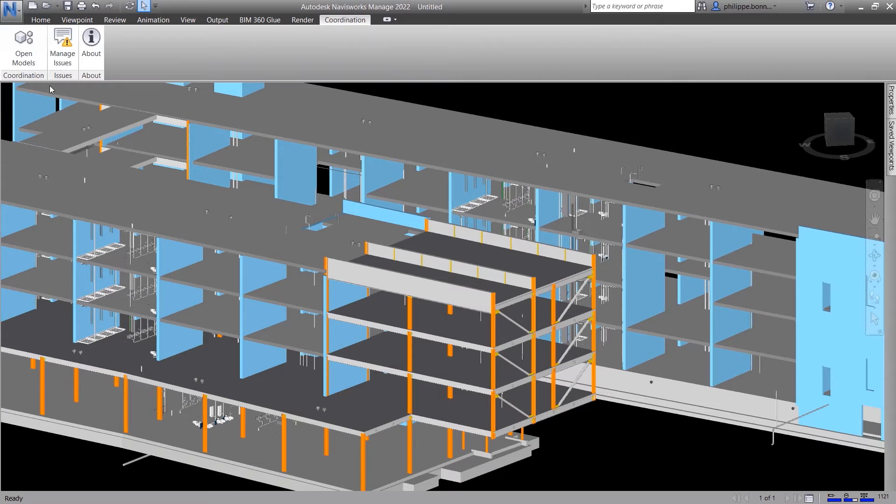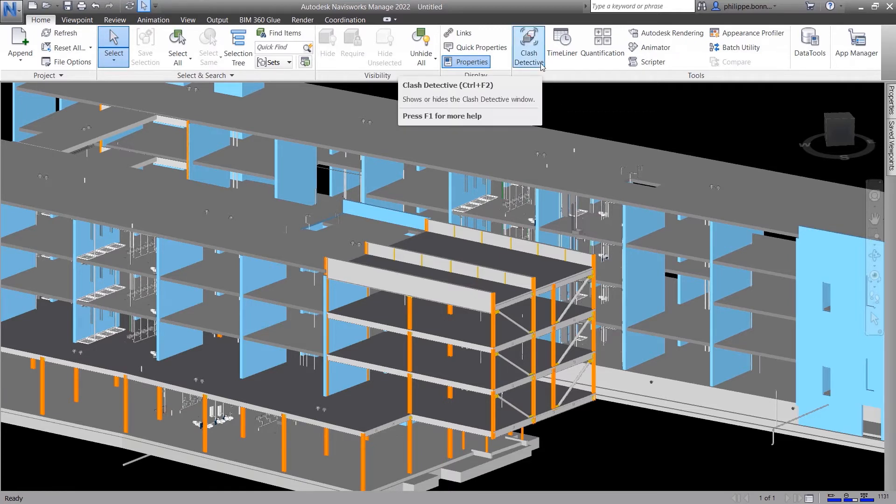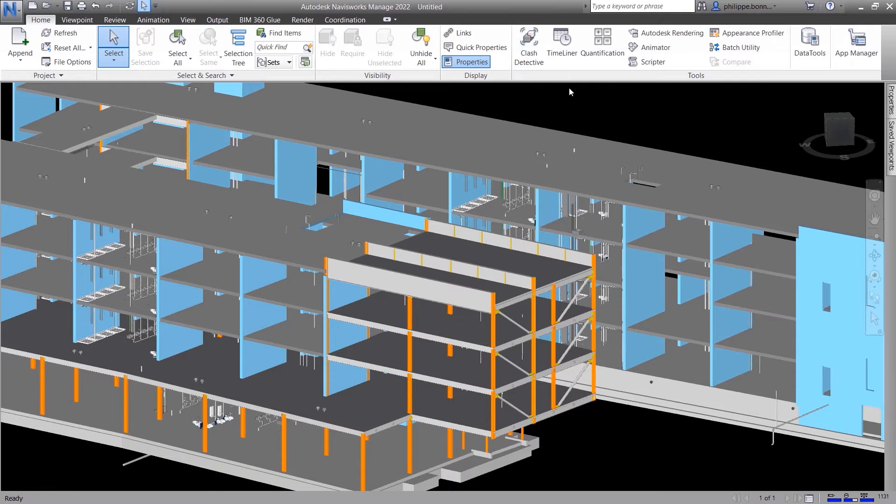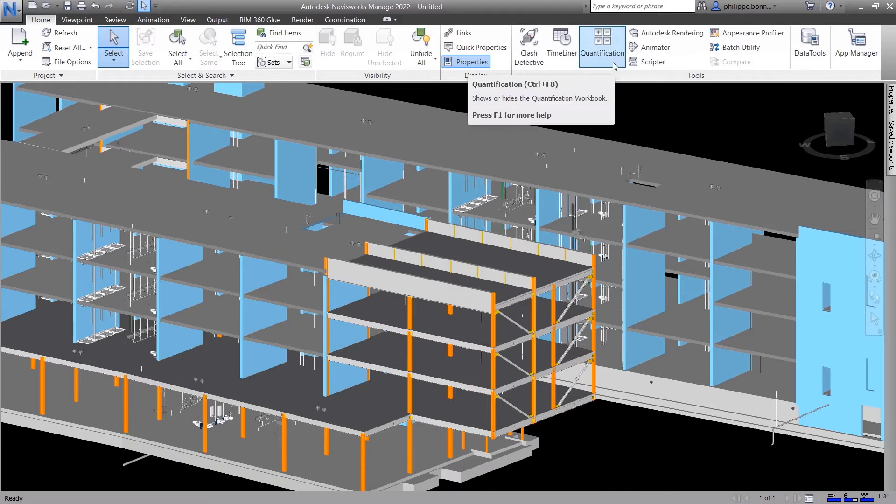Your project team can combine the powerful collaboration and coordination features offered by the Autodesk Construction Cloud Platform with additional capabilities offered by Navisworks Manage, including advanced clash detection, 4D construction sequencing and visualization, quantification to support 5D cost estimation, and more.